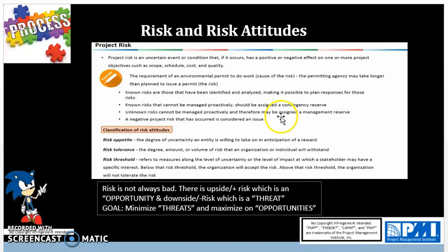And note that the cost baseline consists of contingency reserves for known risks and budget set aside for all estimates, all approved budget estimates. Those are part of the cost baseline. Hence, just one more time to reiterate that the budget is equal to the cost baseline plus management reserves.